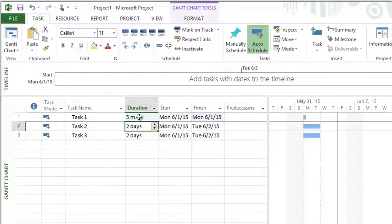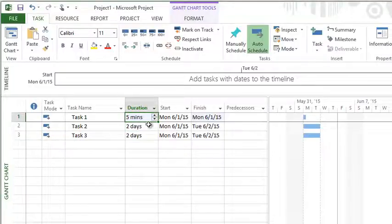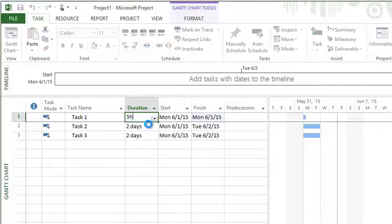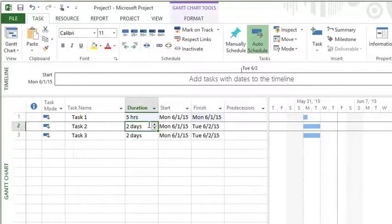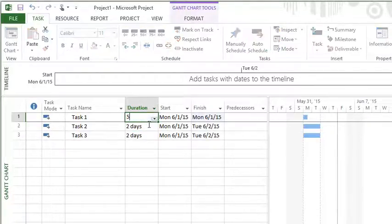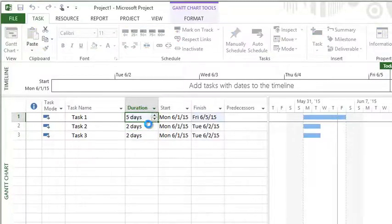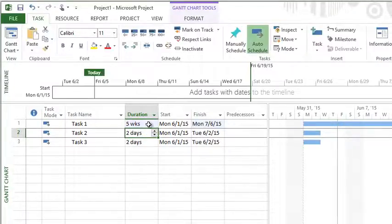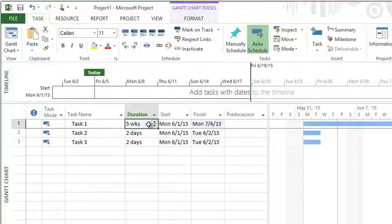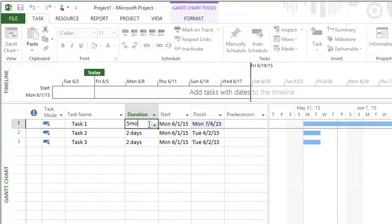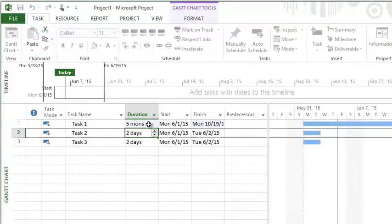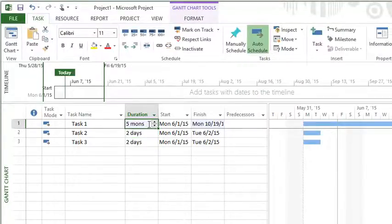If I want to bump up from that, if I did 5h, that's going to do five hours. 5d is going to do five days. 5w is going to do five weeks. 5mo is going to do months.